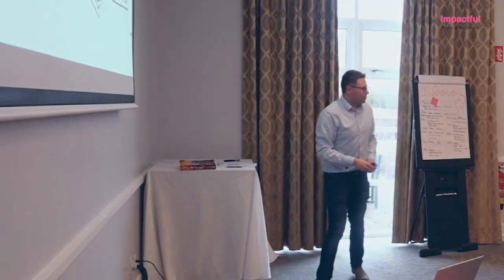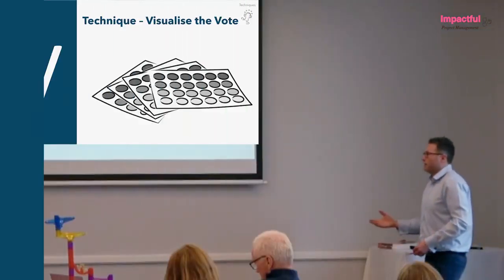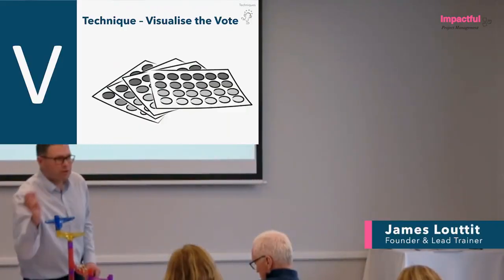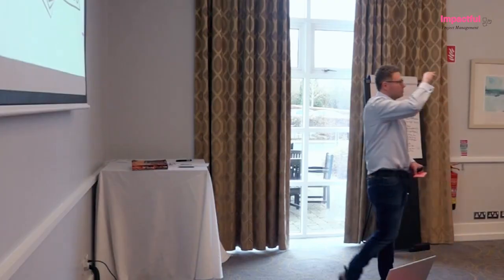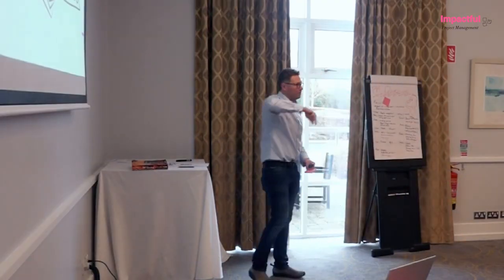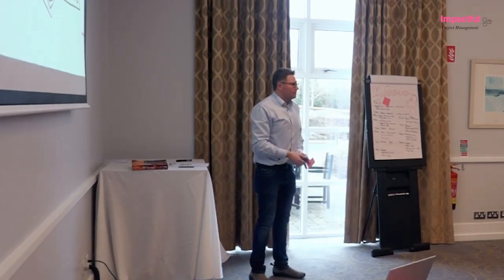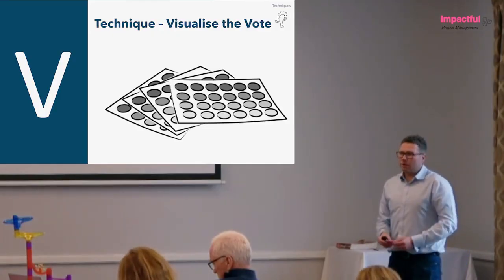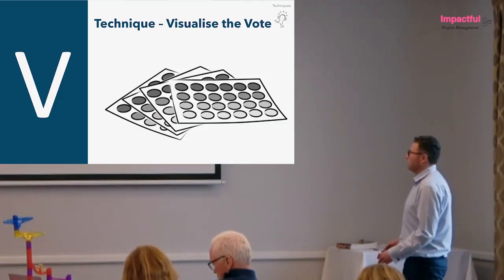And then you need to prioritize the topics that need to be thought about in this particular area. You can use the little stickies, or you can use the Sharpies, and you give people a chance to vote for the most important. So if you've done your affinity clustering well, you might give a little title to each of the clusters, and then people can vote for which ones are the most important. And then you can turn that into a risk log, or into a plan. We're going to use some of these techniques as we go through.